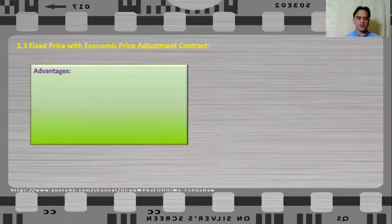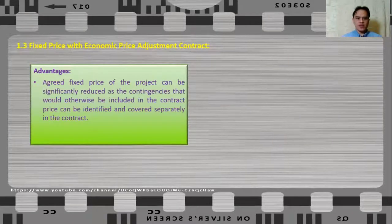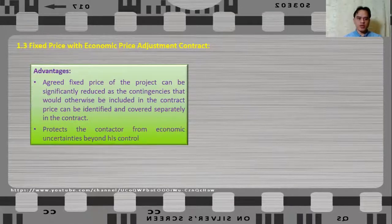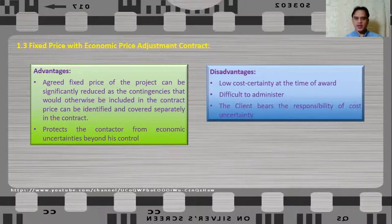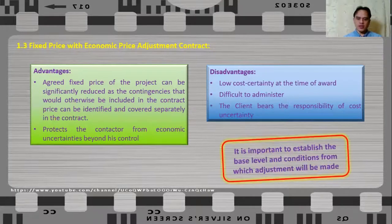The advantages of fixed price with economic price adjustment contracts are: the agreed fixed price can be significantly reduced as contingencies that would otherwise be included in the contract price can be identified and covered separately; and this type of contract protects the contractor from economic uncertainties beyond his control. The disadvantages are: there will be low cost certainty at the time of award; it is quite difficult to administer; and the client bears the responsibility of cost uncertainty. It is therefore important to establish the base level and conditions from which adjustments will be made.